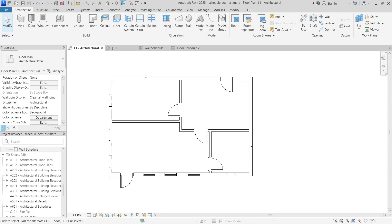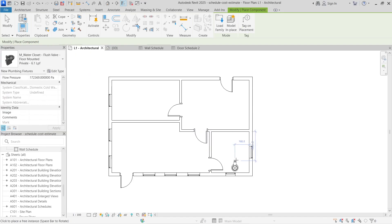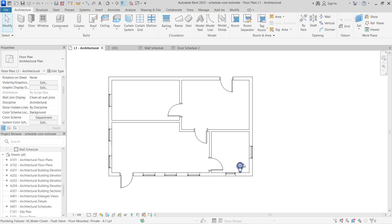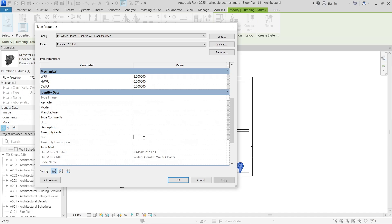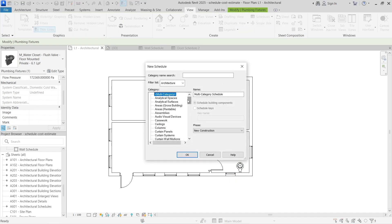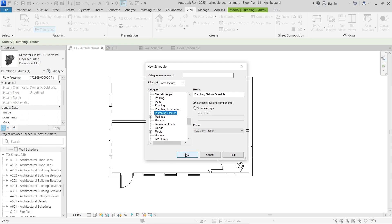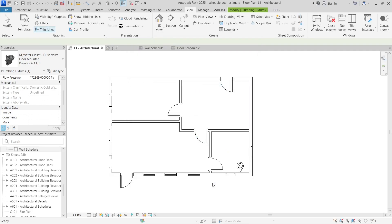This works not just for walls and doors — I've also added windows. You can also do this for components. For example, let's add a water closet to represent a mini toilet. Drop the water closet into the building, select it, go to Edit Type, and input the cost of one water closet based on your local construction area. Once you've entered the cost, click OK.